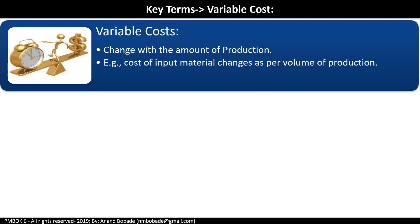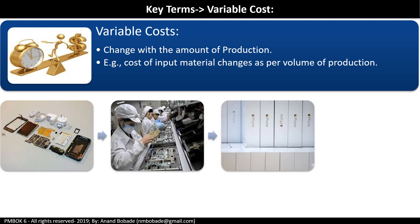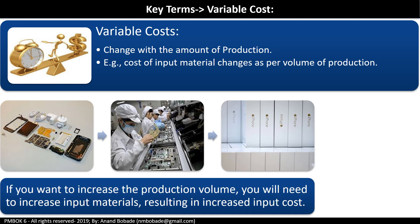Variable cost changes with the amount of production. For example, the cost of input material changes with the volume of production. If you are manufacturing 1,000 phones per day, the input cost might be $200,000. If daily production increases to 2,000 phones, the input cost increases to $400,000. The conclusion is: if you want to increase production volume, you need to increase input materials, resulting in increased input cost.